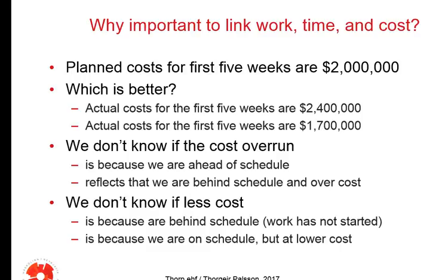Just to take a look at this example. Planned cost for the first 5 weeks in our project is 2 million. So when we check, we have two situations. What would be better? Actual cost for the first 5 weeks is 2.4 or 1.7. Which one is better? We don't know. It's impossible for us to answer which one is better, because we don't know.